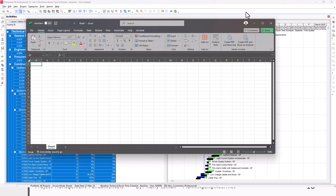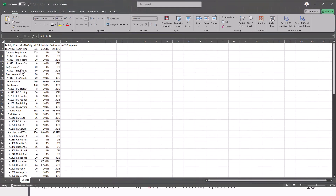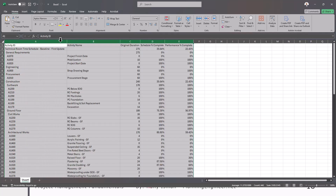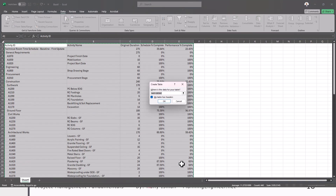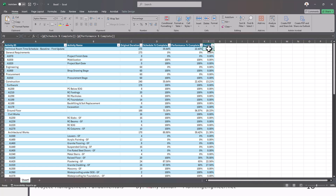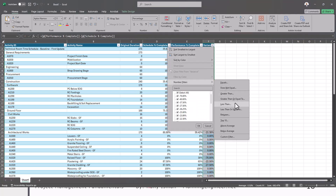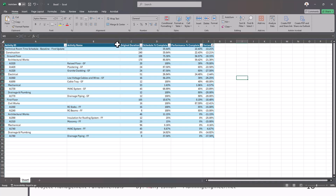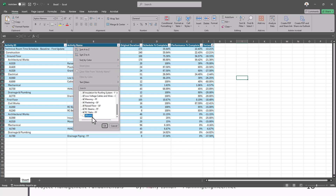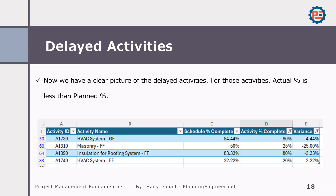I'm going to open an empty Excel sheet. Right-click and paste. Now I have my data from P6. I'll select all my data, then press Ctrl+T on the keyboard to convert it to a table. I'll make sure to check that my table has headers. Now I can add one more column — I'll call it Variance. I'll make the formula equal to actual minus planned. Then I'll set my filter to less than zero, so it will show only the delayed activities. Here I have the delayed activities. If I want to get rid of the WBS rows, I can also apply a filter to remove those. These are the delayed activities — this is how simple it is.